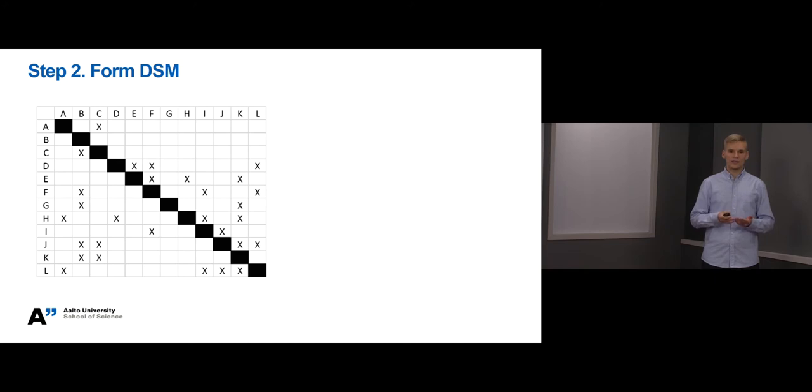Alright, here we have documented the interactions of project alpha and formed a matrix representation. So how do we interpret this matrix? Well in general, rows indicate the information that different tasks require. In turn, columns indicate the information the different tasks produce for other tasks. I will give you some examples.